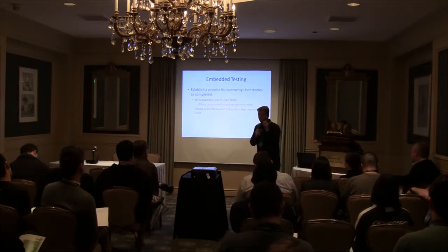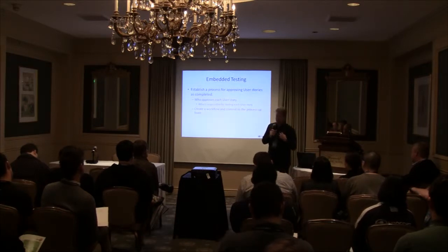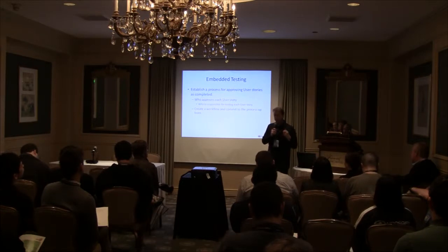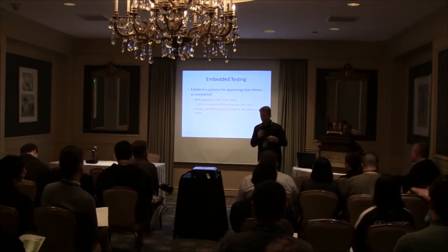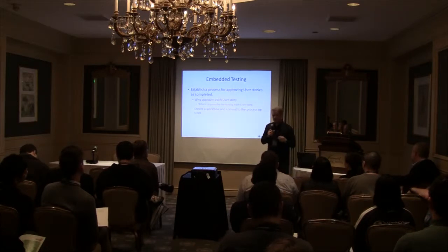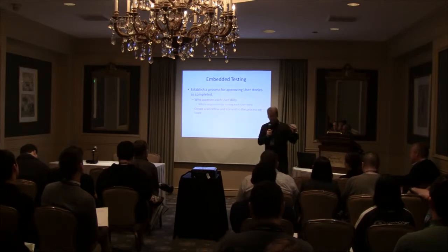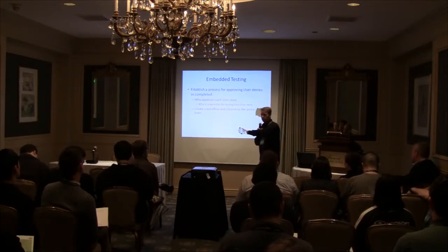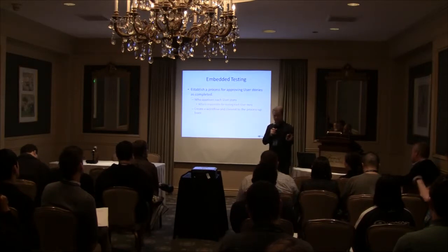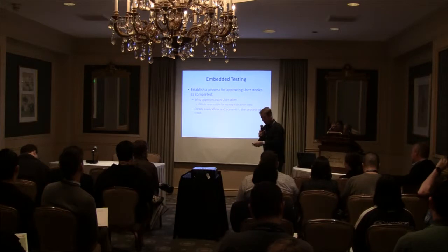They're going to check for acceptance criteria, so that will, of course, make me think twice. But even more importantly, they're going to check it for those dumb bugs, the crashes. When I checked it in, did I break something that it touches in a major way? So catch those early, and you'll avoid that cascade that happens down the line, where a couple of bugs early in a sprint can lead to a lot of bugs 2 or 3 sprints later, especially when you're working on a long feature or subsection.